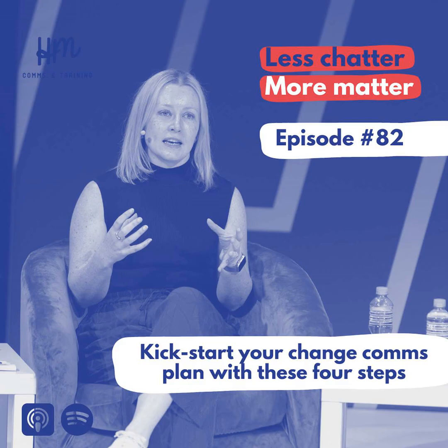Okay, so some of you may be thinking, why would we develop FAQs when nobody's asking questions yet? And wouldn't this just be part of the comms collateral that you develop later on? Those are great questions. Here's my answer. Firstly, because developing the FAQs upfront helps you identify where the gaps in information are. We write down all the possible questions each audience group could ask, and then we attempt to answer them.